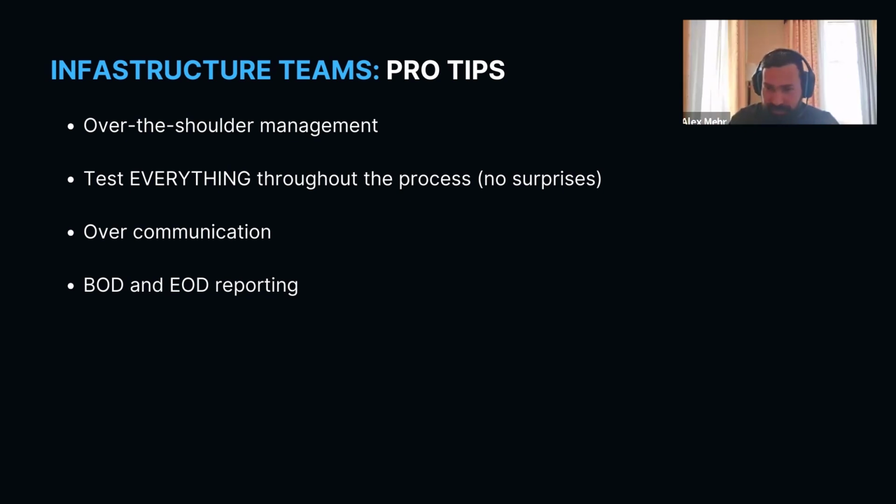So when they start their day, they put a blurb, it's mandatory. Okay. Today, I'm working on this and this and this, and this is what my work is. BOD, beginning of the day report. End of the day, when you're signing off, end of the day report. I worked on this and that and that, and this happened, that happened. It's mandatory. Mandatory. Okay. So always ask for BOD, EOD with the infrastructure team.